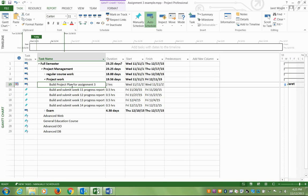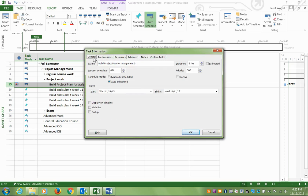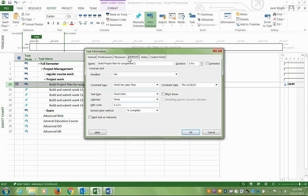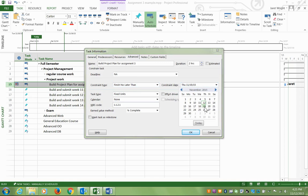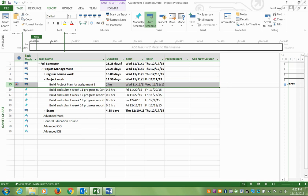The way you can set that, if I double-click, it goes in, and you have all these different tabs. If I go to the Advanced tab, my constraint is called finish no later than, and I can pick a date. In this case, it's due on the 19th, so I said finish no later than. You can see it tells me I can start that right away, but I've got to finish it before the 19th.